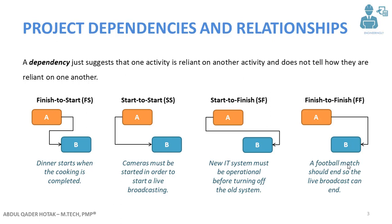The difference between dependency and relationship is that a dependency suggests that one activity is reliant on another activity, but it does not tell how it is reliant to that specific activity. Relationships, on the other hand, clearly show how the activities are linked to each other.